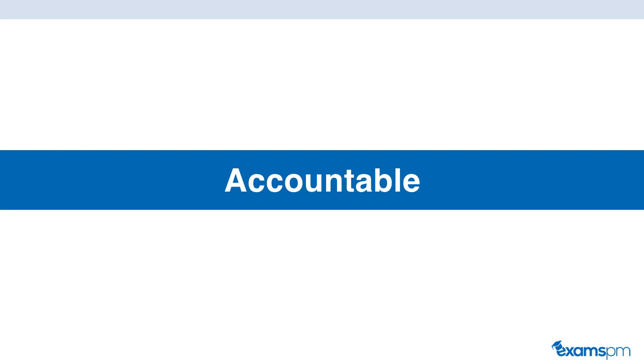Though the task can have multiple responsible parties, it is best to have only one person who's accountable for that individual task in order to avoid confusion and allow faster decision making. There can be more accountable team members for a task that is bigger and more complex.